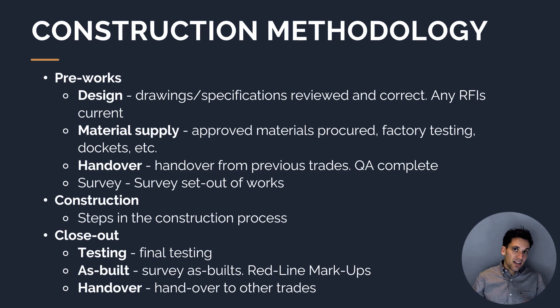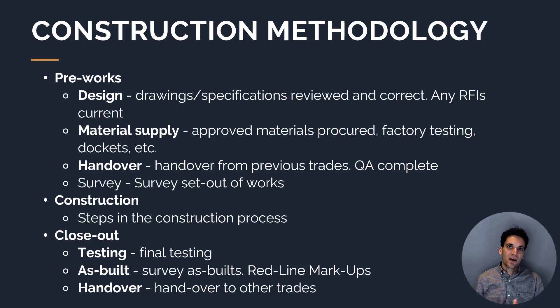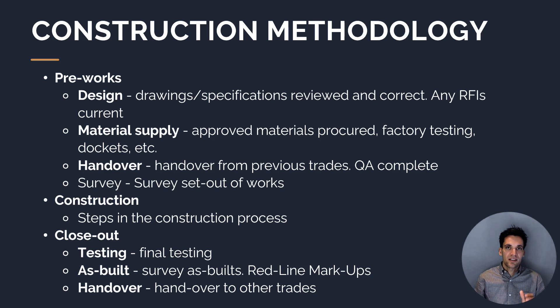For any construction activity, there's a lot of things that can be done incorrectly. So our job when writing the ITP is to come up with a list of all the things we need to check to ensure we're not going to make those mistakes. Each of these mistakes we could possibly make is going to relate to a step in the construction process — so the basis of our ITP is all the steps in the process we follow to deliver the works.